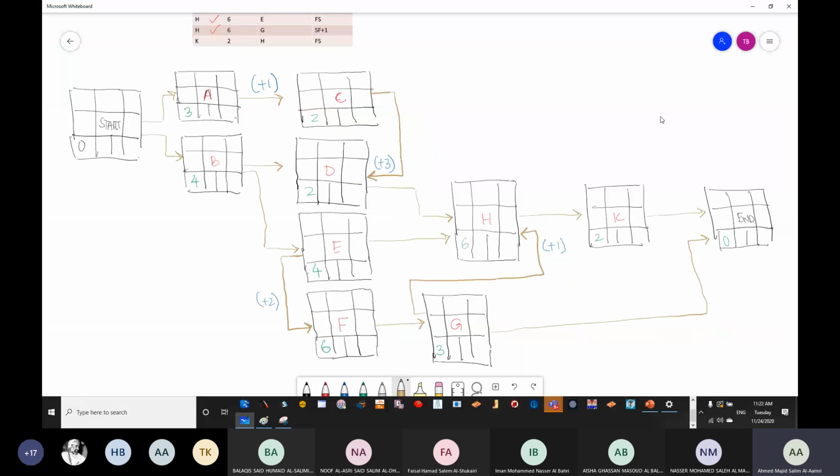Okay, so you can see here, if we try to solve, early start is 0. 0 plus 0 is going to be 0. If you remember, in the forward path, we had taken the tip of the arrow, or the head of the arrow, right? And we said we are going to take the maximum. Do you remember this? If we are going from start to end, we look at the tip of the arrow and then take the maximum. Now you just concentrate here with me. I'm going to try to solve it.